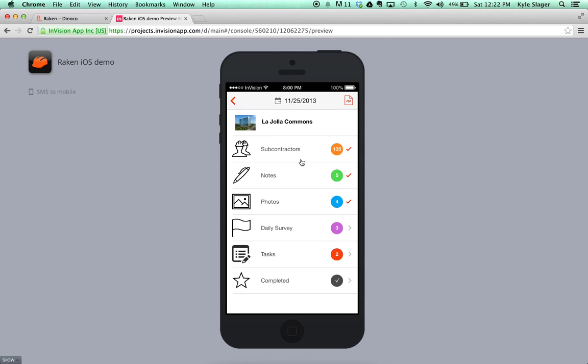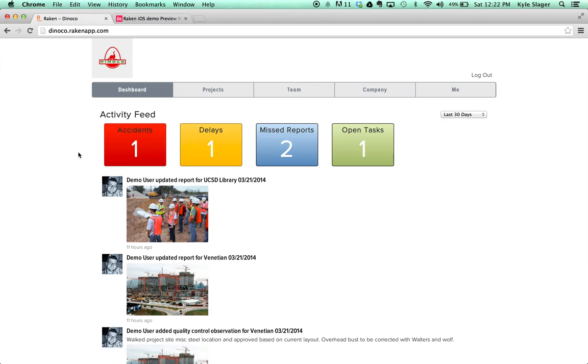As you make entries throughout the day, there are two things that will automatically happen. One, those entries will populate a daily report PDF, and two, they'll sync with the web and populate your activity feed here.